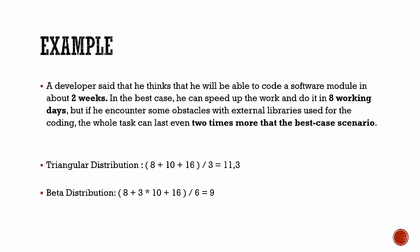Assuming triangular distribution, the estimate for this task is (8 + 10 + 16) / 3 = 11.3 working days. Assuming beta distribution, the result is (8 + 3×10 + 16) / 6 = 54 / 6 = 9 working days.